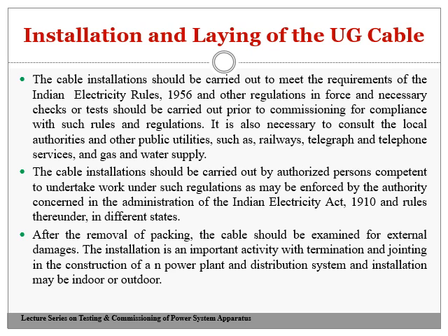The cable should be inspected. That is what we generally do in all electrical equipment. Once the package is removed, the damages are checked, and the cable is checked for its specification, whether they have received the cable according to their requirement or not.